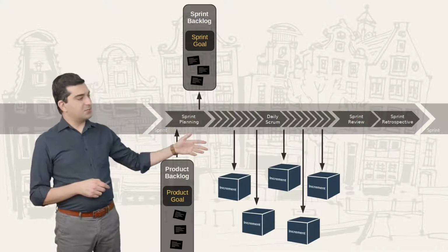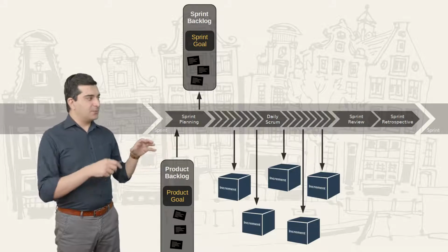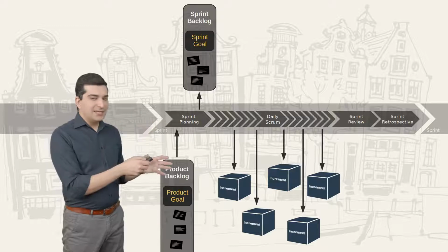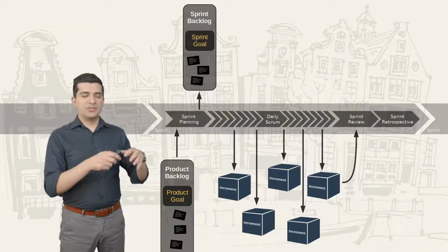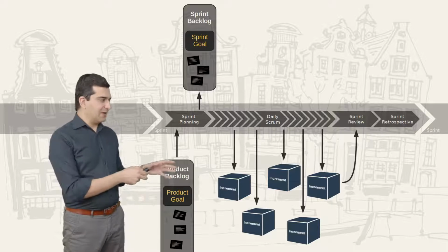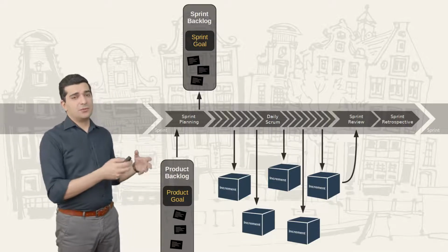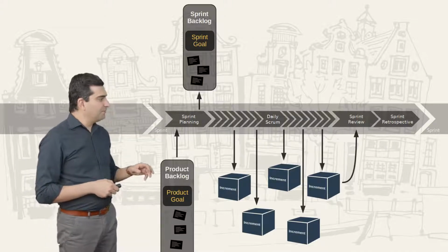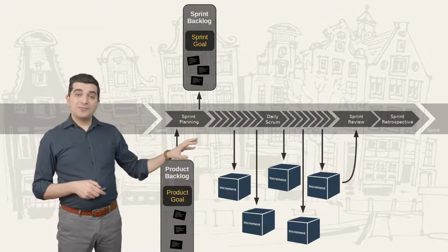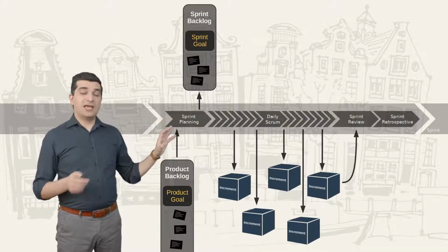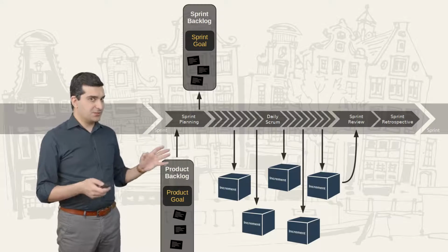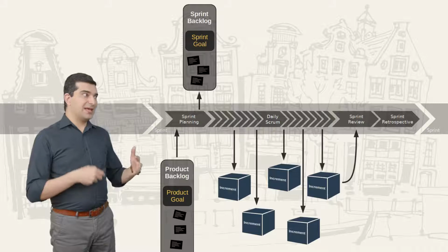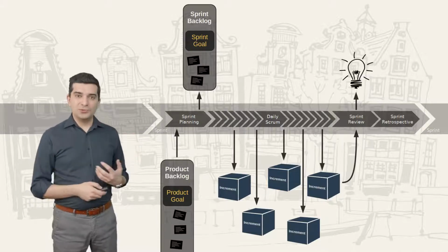We continue like that, and when we approach the end of the sprint, we have 2 other events. One of them is the sprint review meeting, and that's where we check our progress and the latest increment, or in other words, the sum of all increments that we have created here. In most cases, the sum of all increments and the latest increment are the same, but that's a different story. Anyway, we will show it to the customer and sometimes end user representatives because it's not necessarily released. We show it to those people and receive feedback and think about the things we're going to do next.